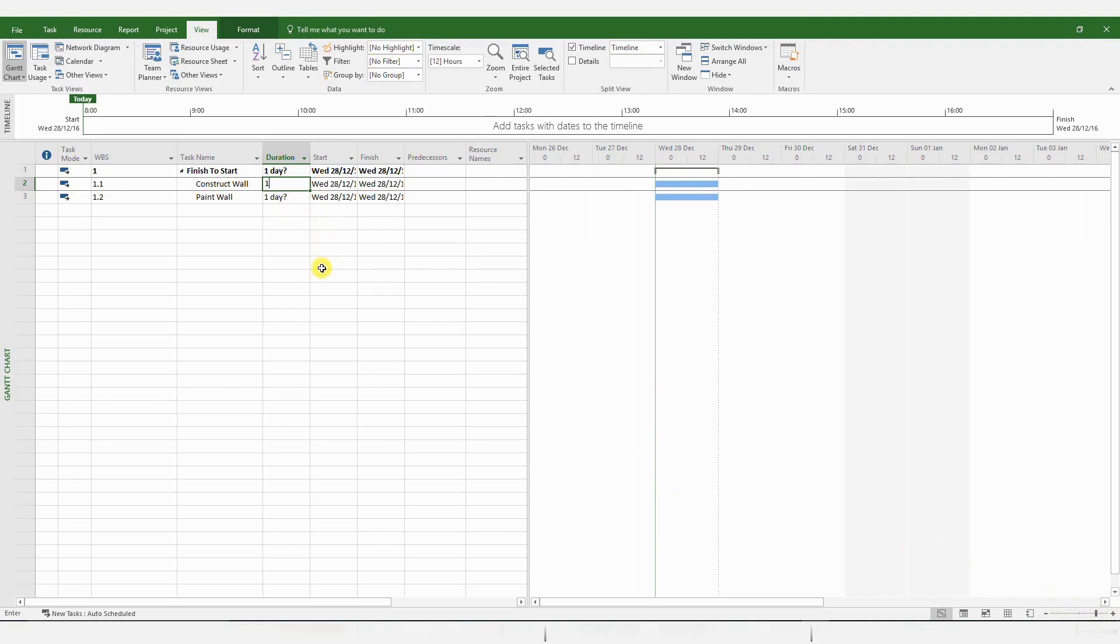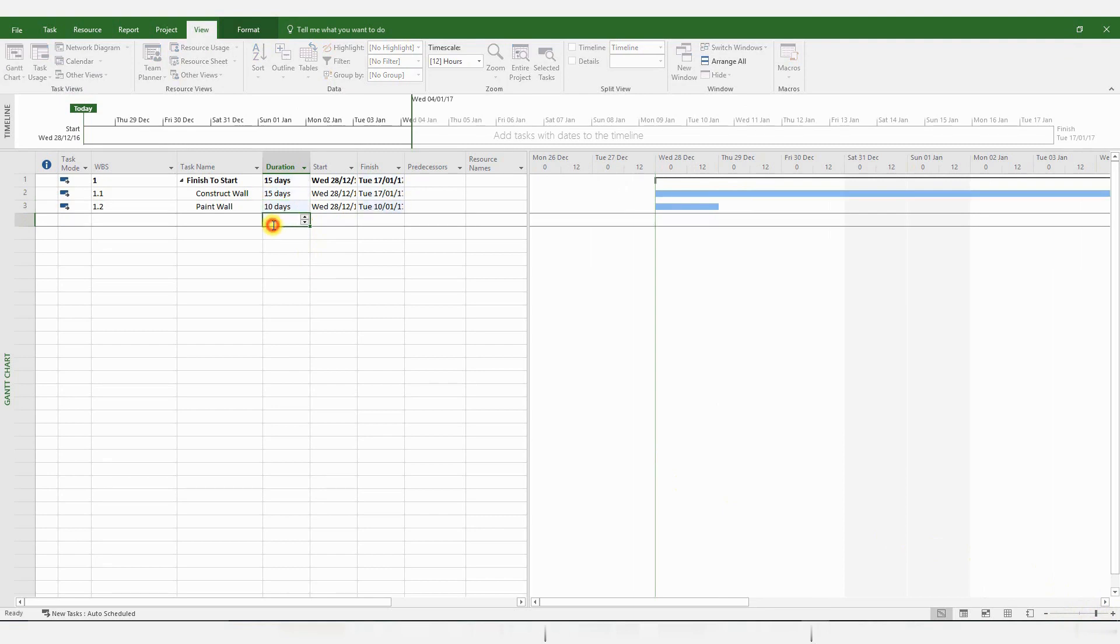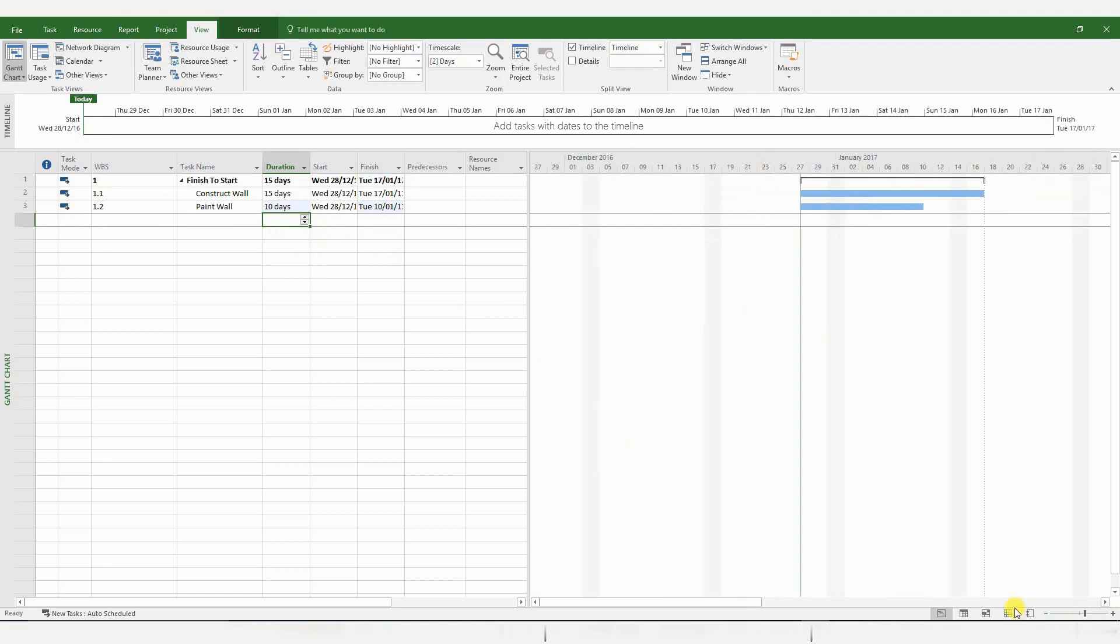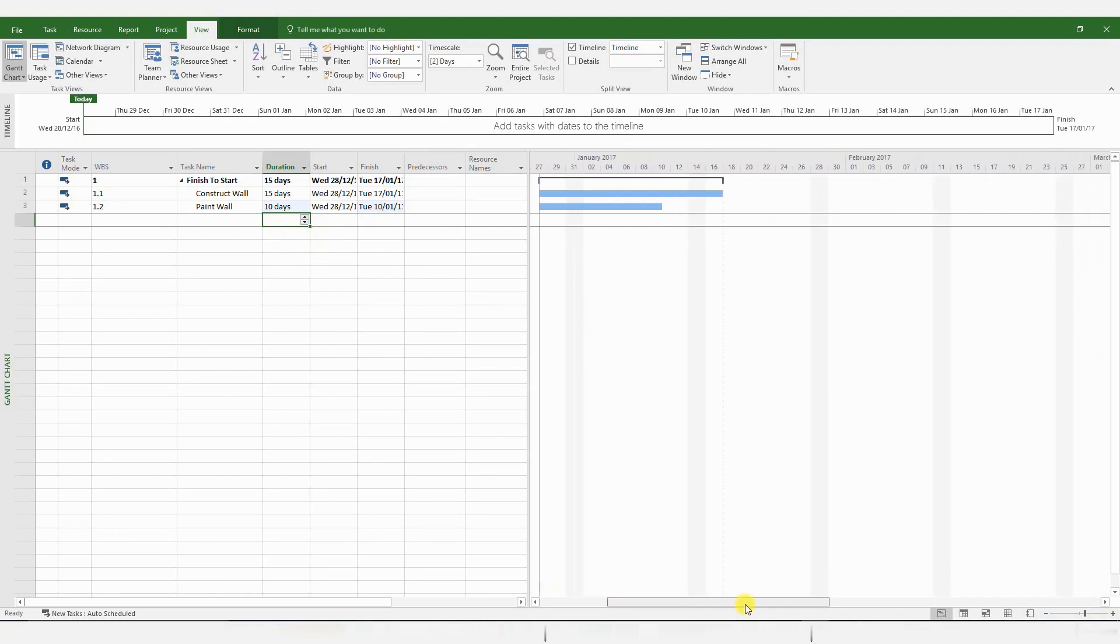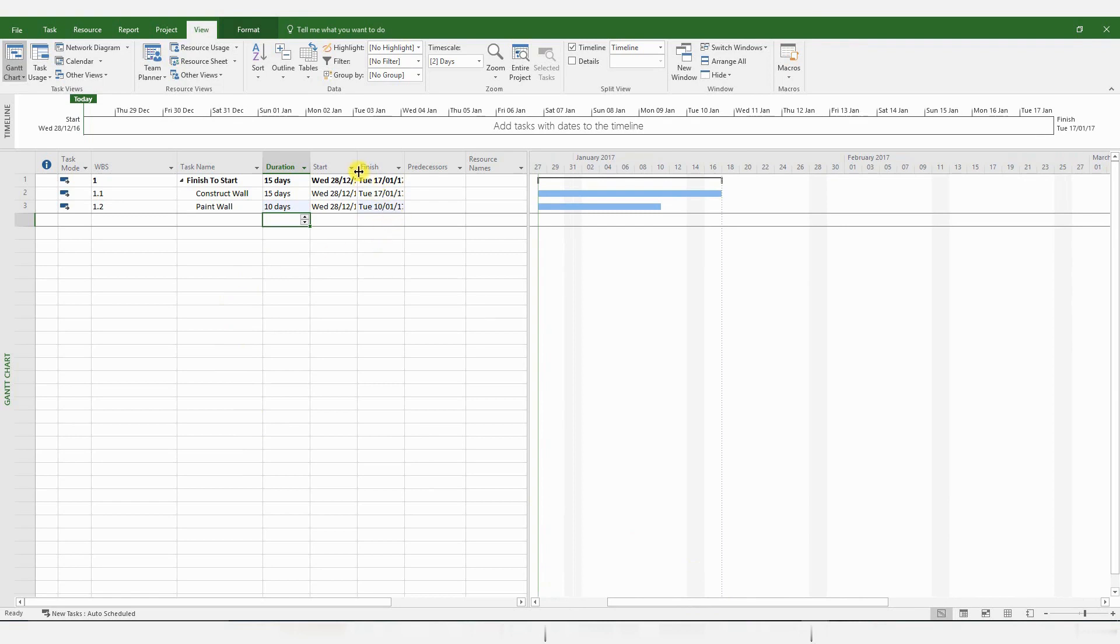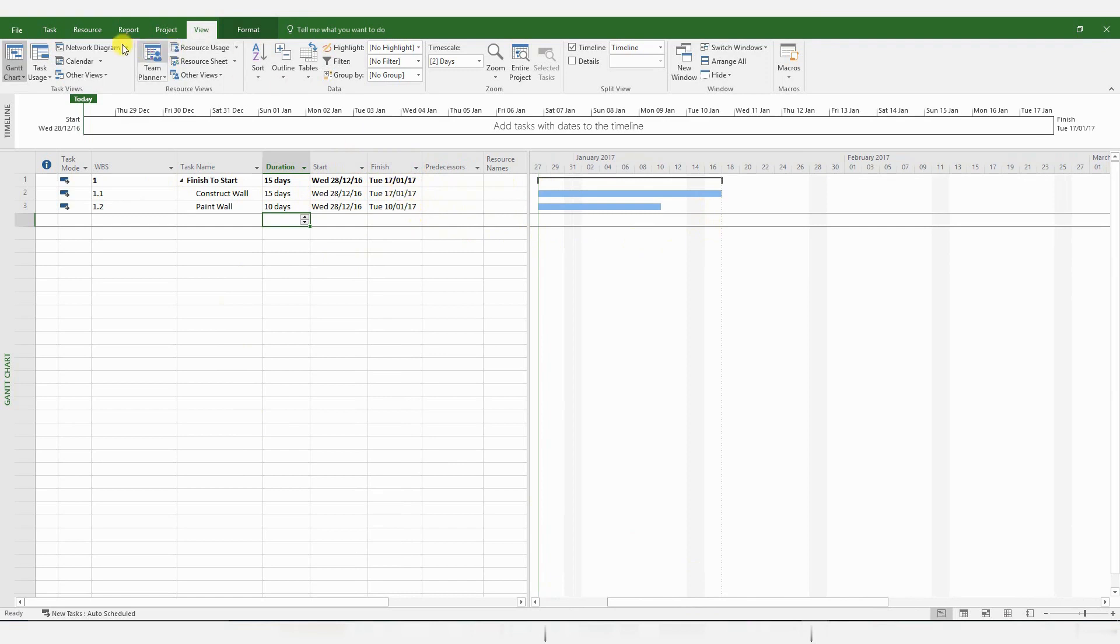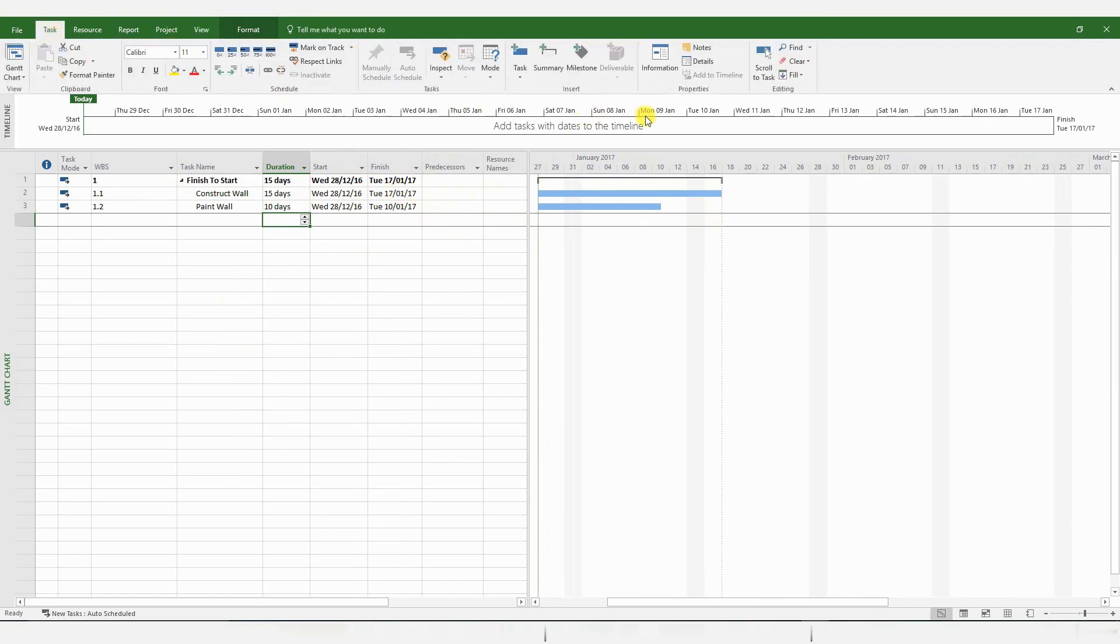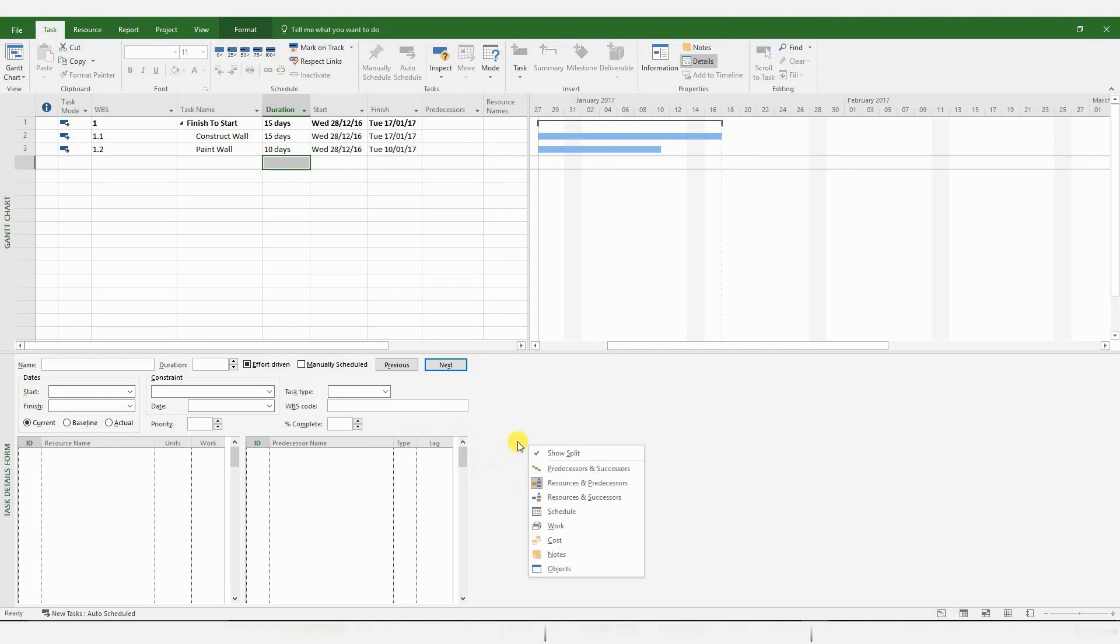You could also adjust the zoom by using the slider at the bottom right-hand corner. Let's give the Construct Wall activity a duration of 15 days, and the Paint Wall 10 days. Now it's always useful to have the Details pane below, so go to Task and click on Details, and you will get this pane below, which is extremely useful for managing your tasks.